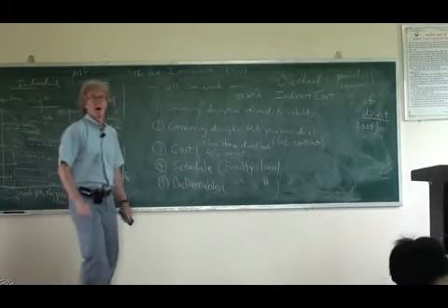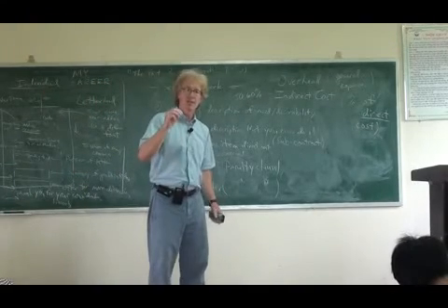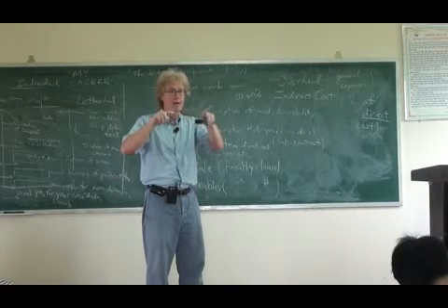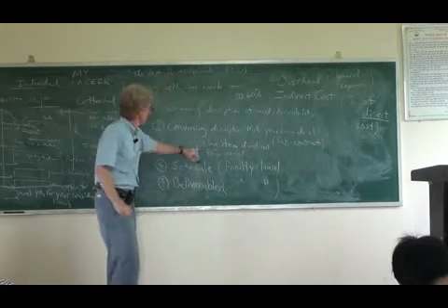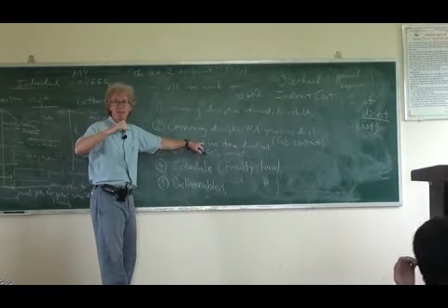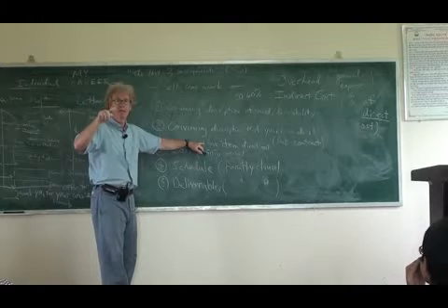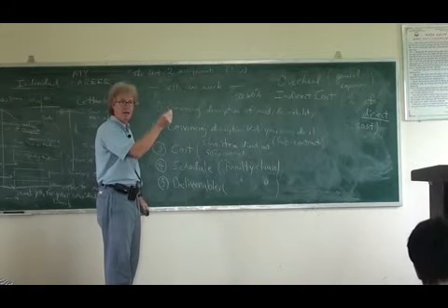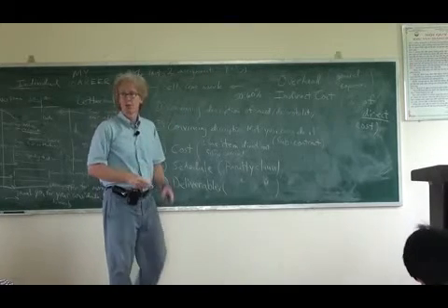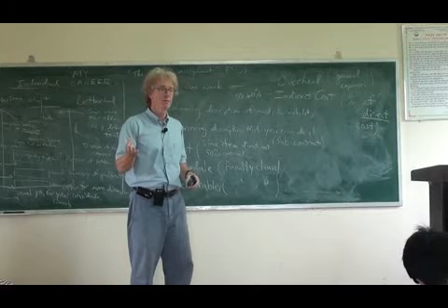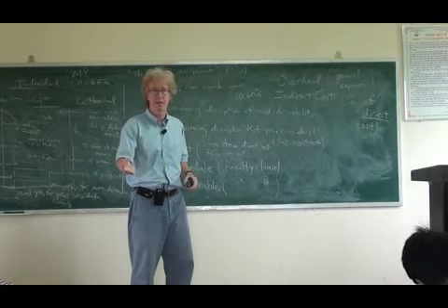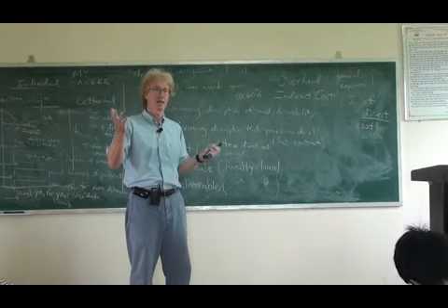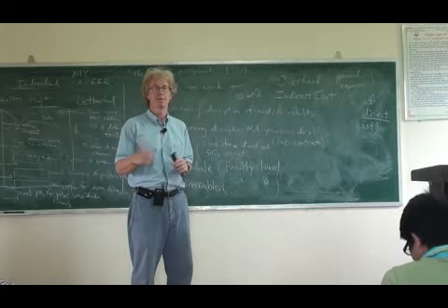Okay? Line item means each individual thing that there will be a direct cost for should have its own individual line. So your line item budget might have something like 10 lines in it. The first line might be salaries, and beside that there's a number. And then there's a little explanation of how you came up with that number. Right? So salaries would be, I don't know what the going rate is for engineers in Vietnam, you're going to look that up. You're going to put in a reasonable salary for yourself. You don't work for free. But let's say your salary is, I don't know, I'll make up a silly number. Your salary is $5,000